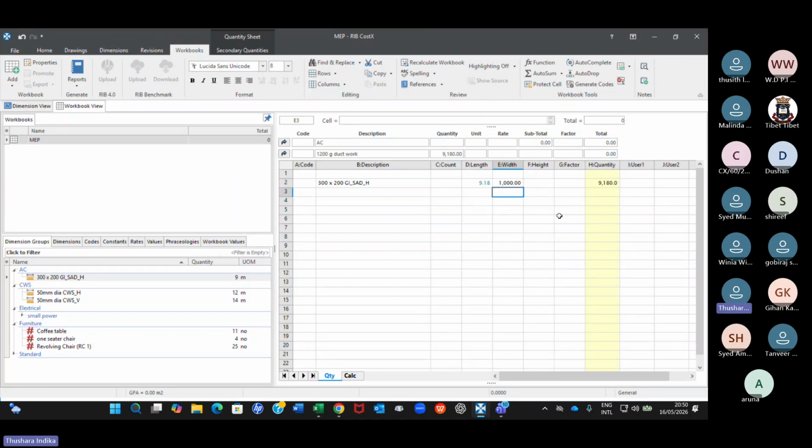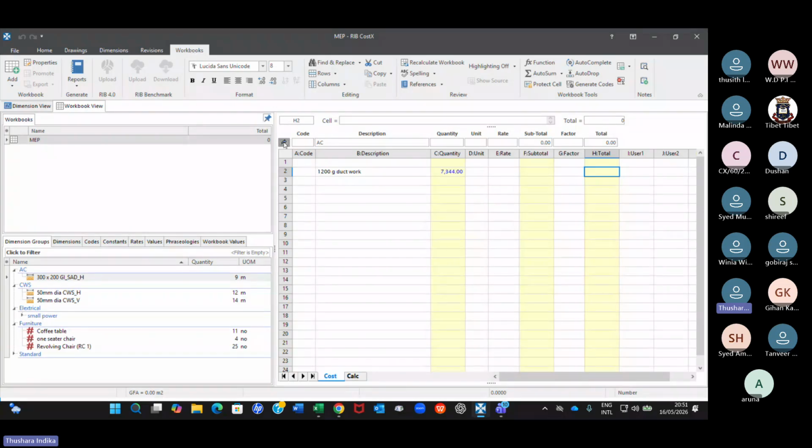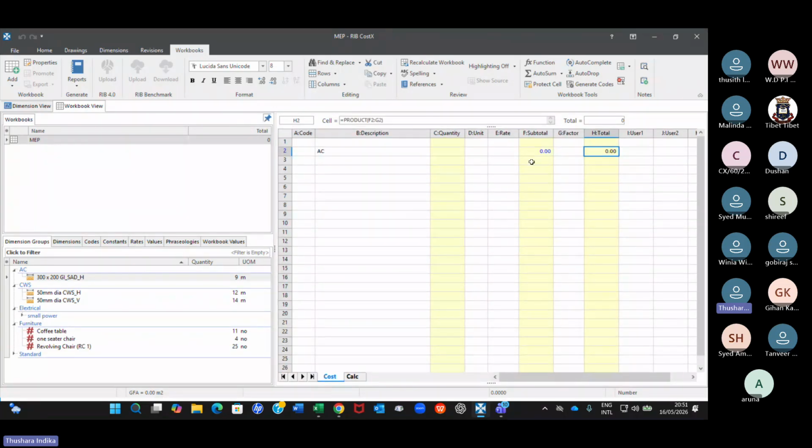Now you see the square meters in quantity. And if you want to convert this one into, let's say, kilograms per square meter, then you can apply even the factor. Let's say 1 square meter is about 0.8 kilograms. And you can apply the factor here, and you should get the kilograms now. And the unit should be, sorry. Okay. I made a mistake. Why?